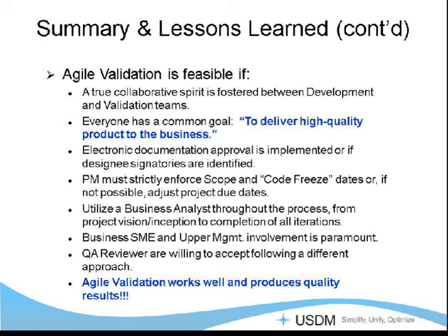So literally we would negotiate scope 3 weeks before we were going to move to validation. So it was a balancing act. So the project management role in this case is very, very critical. You really need a business analyst to help with those requirements. Keeping the upper management in this project and any project is critical to being able to have the backing that you need to really be able to deliver this kind of an approach.